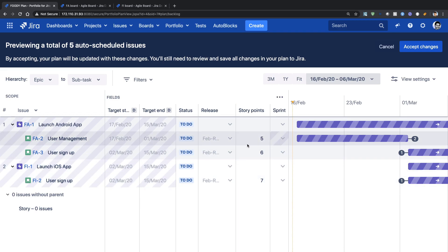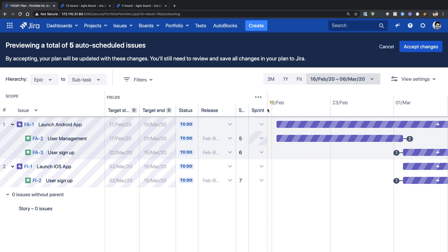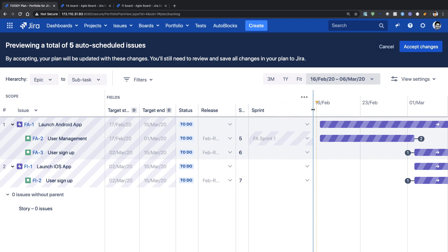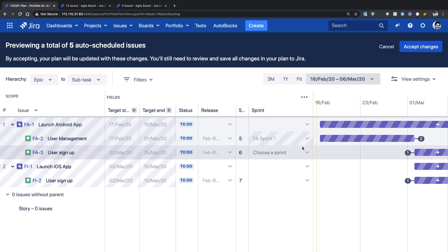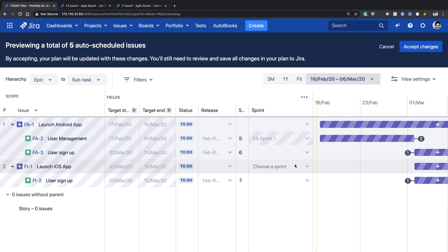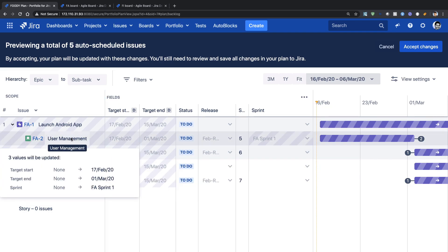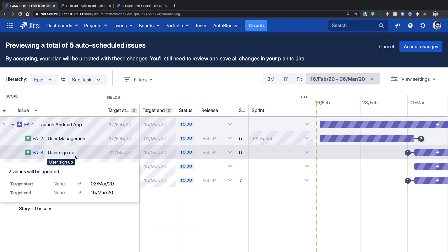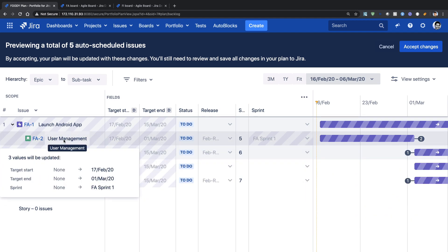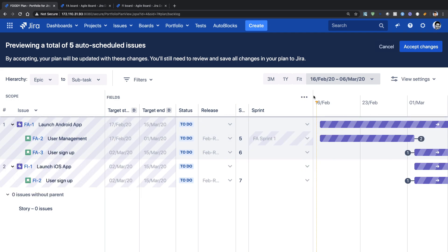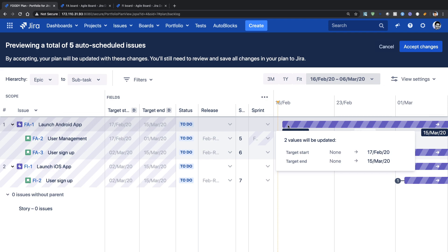Let me expand my sprint column. Right now, Sprint 1 which is part of my Android project is assigned to the user management feature, because it considers the dependencies. Right now there is a dependency on user management to finish before user signup can be started. That is why on the schedule you can see that these two user signup stories are scheduled after the completion of user management, which is actually fine and something we can live with.